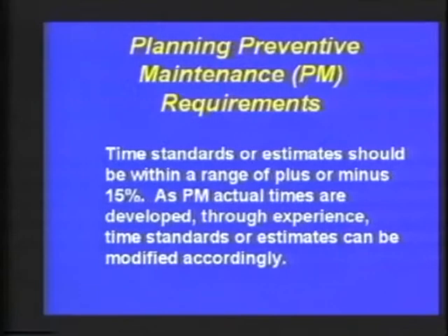And if you do this step by step properly, you'll find that you'll be able to develop those incremental time periods and then go through a summation of all of the steps or sequence numbers, and then you'll have a total for that particular PM activity. Once that PM order has been released through the scheduling system and the craft personnel actually perform their work, it is through the process of clocking in and out on the PM work order, which gives us the opportunity to compare the actual time against the estimated time.